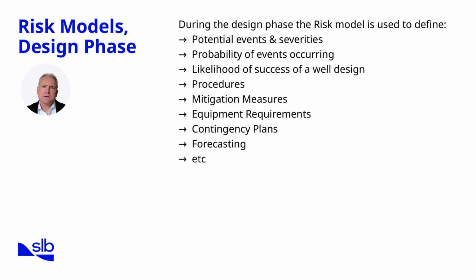The model also evaluates the likelihood of overall success for the well design, which is vital for economic justification and stakeholder approval. We also embed procedures directly into the model, ensuring that mitigations are not theoretical but operational. Equipment requirements are tied in as well. If we expect potential kicks, for example, then BOP specifications and testing requirements are defined in advance.